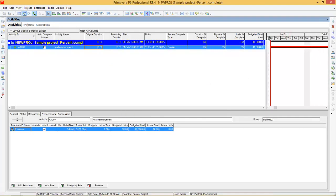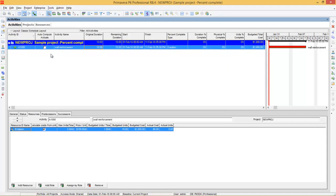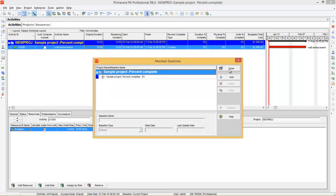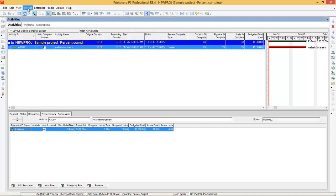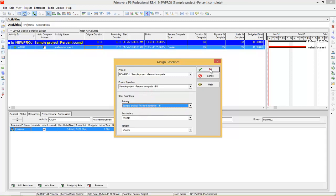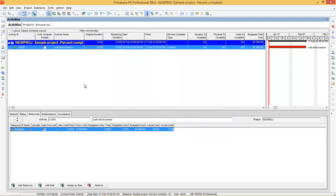After that, you can schedule the project. Right now you can see the critical activity. After that, you need to set the baseline — go to Project, Maintain Baseline, press Add, press OK, and close it. Then go to Project, assign the baseline to the project, and press OK.